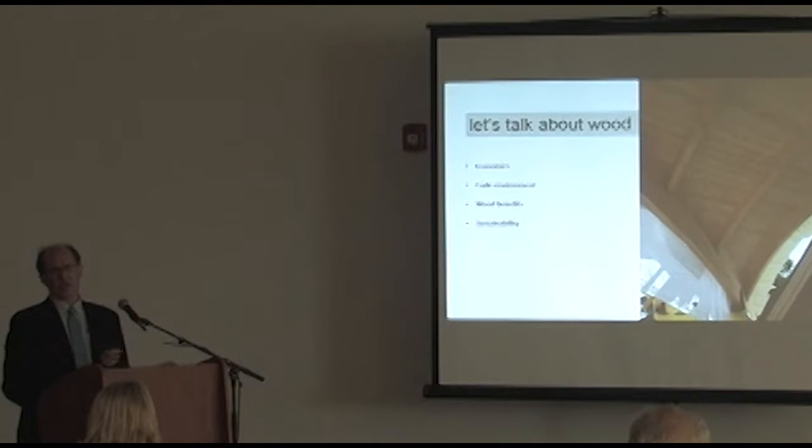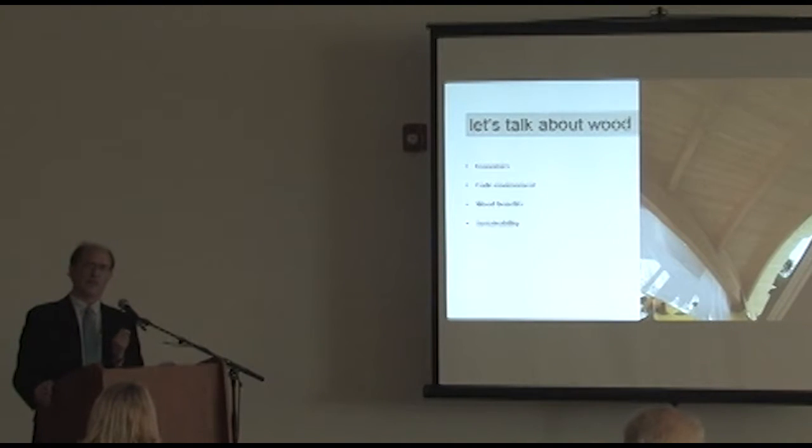And the light weight also mattered, because part of this whole thing was we had to support this new shape on top of the building. So we had to drill down through the building and put in 10 new foundations. Those 10 columns that we stuck down through the building had to land somewhere. So having a lightweight, lower foundation was a positive benefit as well.